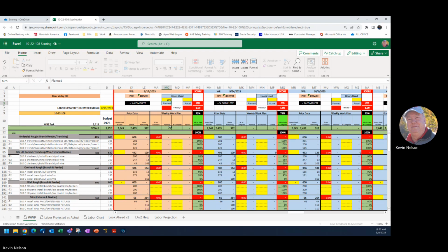So if you recall from What is PAR, that's another video that you can look at to help you with this. They're all somewhat sequential, and you should probably start with What is PAR and then How to Create, Upload, and Assess WWP. And now we're into how to score your job. So what I'm doing right now is I'm pre-scoring the job. And I've determined that I'm going to use 200 hours. That's what's on the labor chart schedule. 5 guys, 40 hours a week, 200 hours.